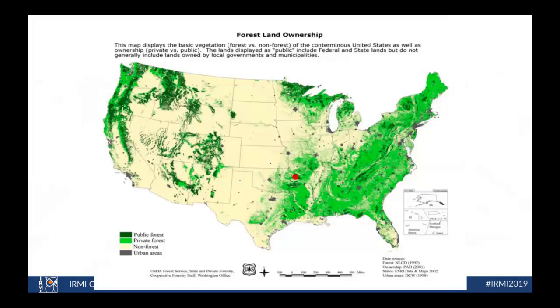Just like we would see a premium a few years back of maybe 6%, we're closer to 2% premium now to do a mass timber job, and we believe that within the next 2 years we'll be at zero or negative cost compared to a steel concrete building. It just takes time for people to understand what it is. It takes more competition with manufacturing facilities and more people that have erected and installed it. So, all that's coming.